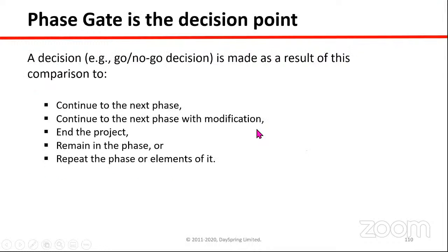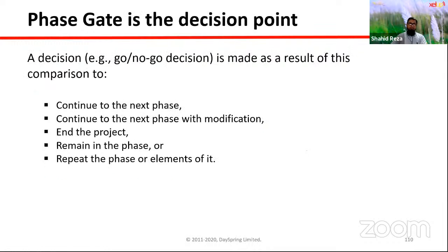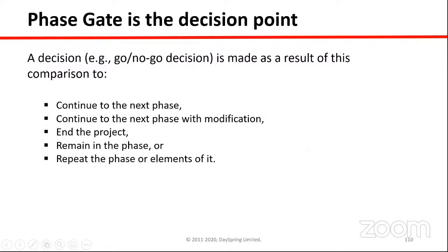But there is some difference between phase, gate, and milestone. Completing a milestone, we cannot go for the second phase. Phase and milestone are different, because a phase has many components and looks like a project, but a milestone is just a significant component of the project.